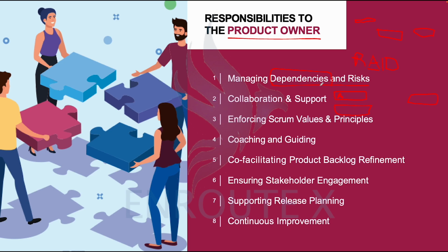So in the illustration that I made, laying of pipes has higher priority to pouring the concrete. So we want to bring laying of pipe as a task or as a story earlier before the concrete will be poured. So that is one of the ways we deal with dependencies going forward. But again, when we cross over to the product owner training, we will be able to expand on that more.